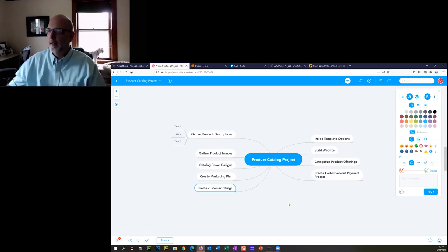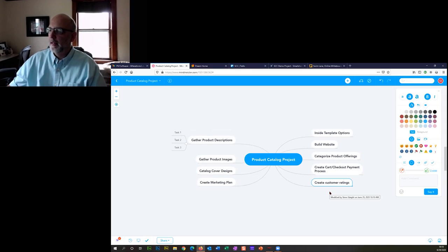All right, good. All right, so here are some ideas. Now, let's look at the order that everything is in. So let's assume that we're going around the circle like this, starting with gather, then we're gathering product images, catalog cover design, create a marketing plan, create customer ratings. Are those in the right order? I would suggest that customer ratings is probably the last thing, so we could slide that over there.